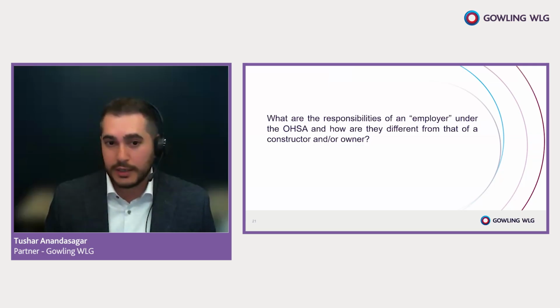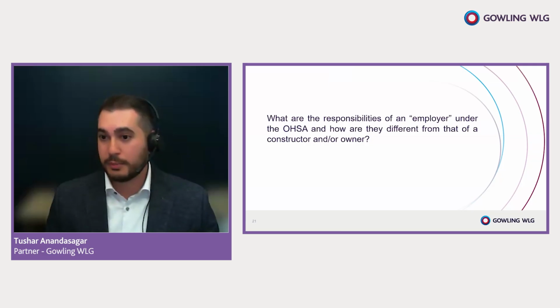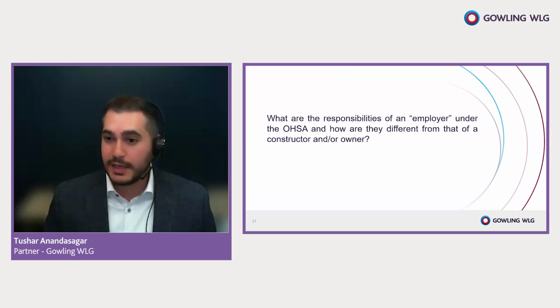A constructor is a party that oversees a construction project and effectively coordinates all of the work. And so they have coordination specific responsibilities. They need to ensure that every employer, right, so every subcontractor and worker on the project complies with the OHSA, and that includes supervisors and stuff like that. They have to maintain overall site safety, which is broader than the responsibility of an employer, regardless of which contractor actually employs the worker. And they have to prepare and implement a health and safety plan for the entire project. So there are further responsibilities.